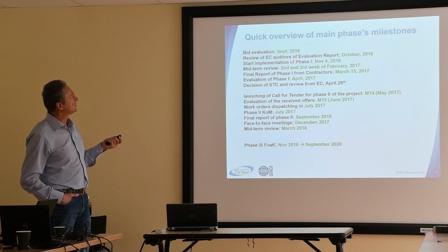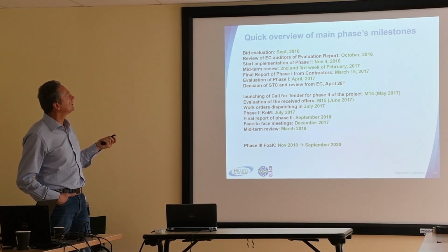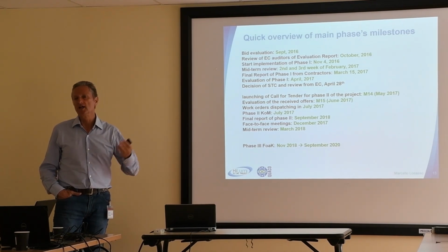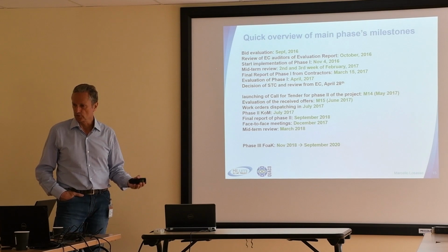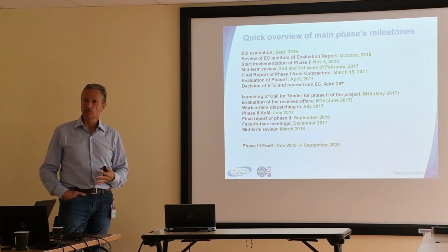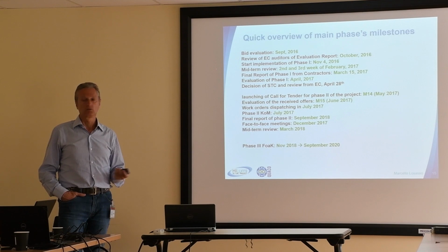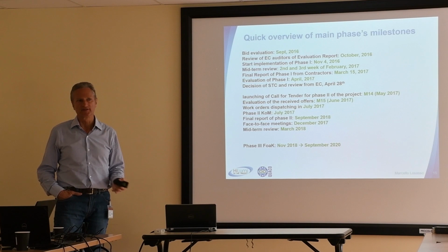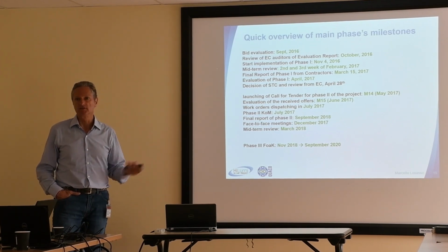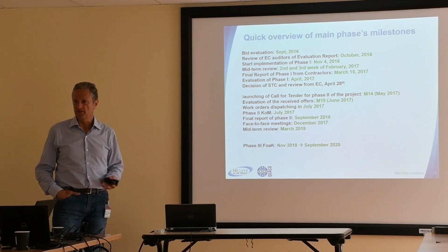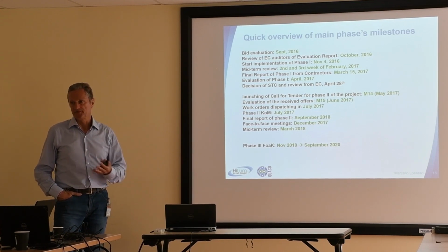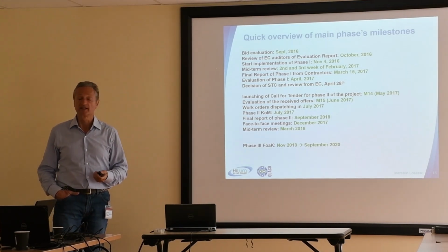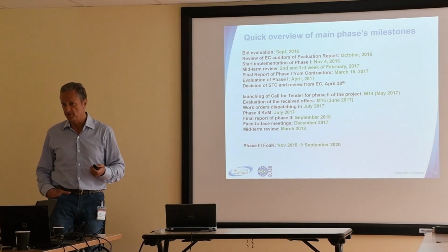Then you start the implementation of the phase. Then you may have a midterm review with the contractors. Of course, you have weekly interaction with the contractor, but in our case I thought it was important to have a midterm review, because if you have a project that runs for 48 months, with let's say 1 year for phase 2 or phase 3, you need well-defined milestones, and they are also linked to deliverables and to the payments that you give.